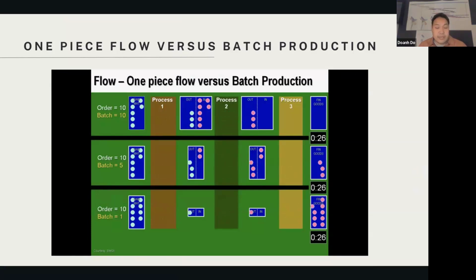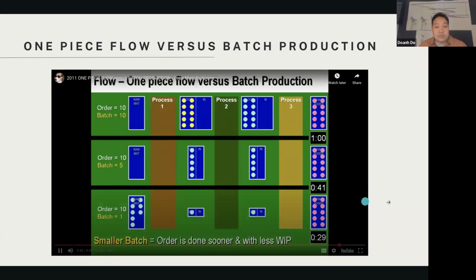So as you can see, if you have a smaller batch size, things move faster. This is why the smaller the zones and the shorter your TAKT time, the faster you finish the project. But obviously, it's still a design decision about what you want to do with the project. So not having a shorter TAKT duration is not always the right move.